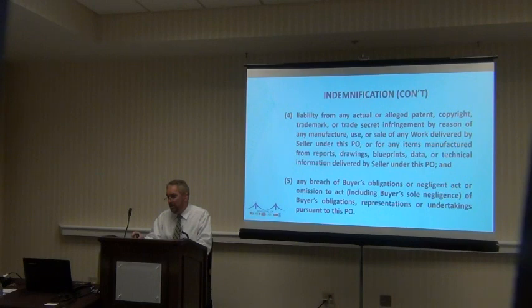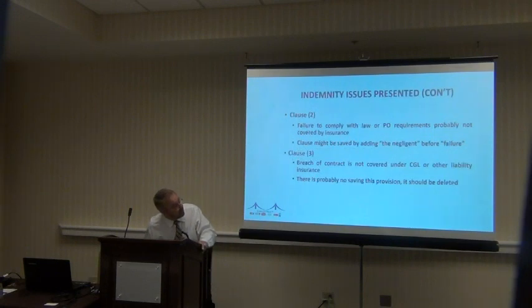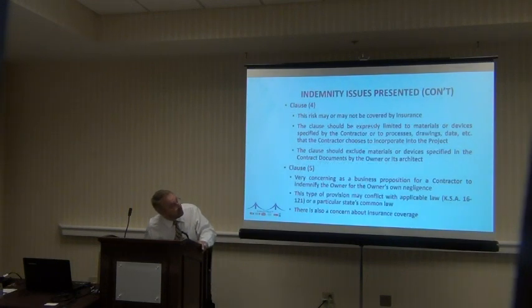Joe, if they can carve it outside of the construction contract, such as a material supply, a trucking, anything like that, then the indemnity statute doesn't apply. Yeah. So they could get the broad. Yeah, there is no general broad prohibition against sole and broad form indemnity in Kansas, other than the statute. And from an insurance standpoint then, how often do you have to provide insurance for a broad form indemnity requirement?